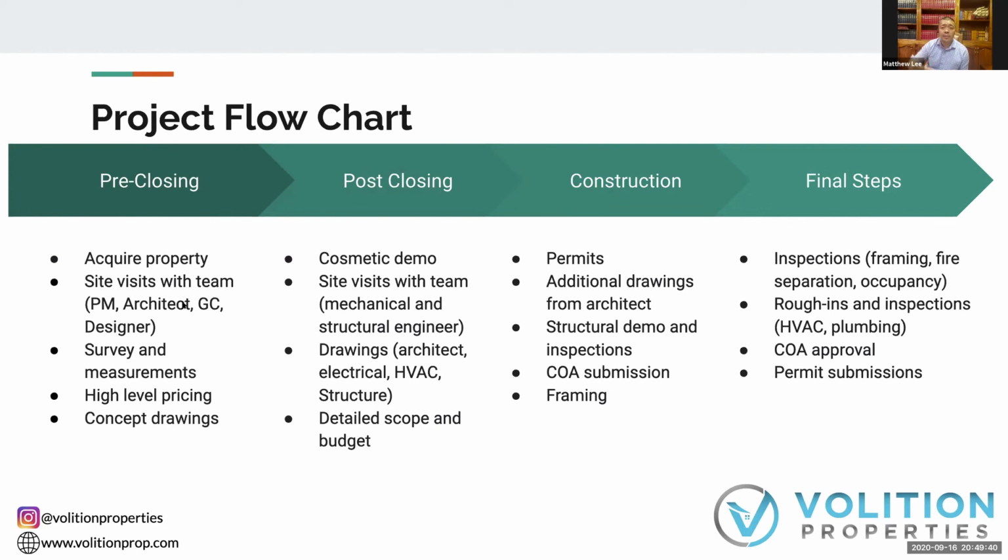And then if I go to put in my third unit afterwards, and then he comes back and he's like, wait, you are missing fire separation, or I don't like the way that you guys did this, I have to tear it down and do it all over again. So it's really important at the beginning of the inspection process to develop a good relationship with that inspector and be transparent as to what you're up to. Remember, you're not doing anything illegal here.